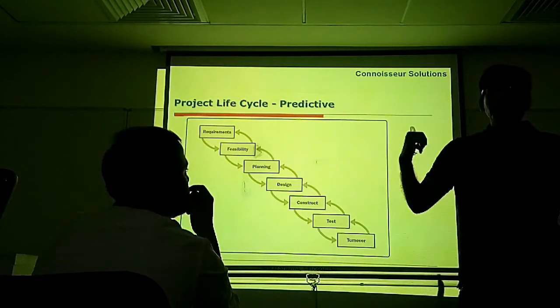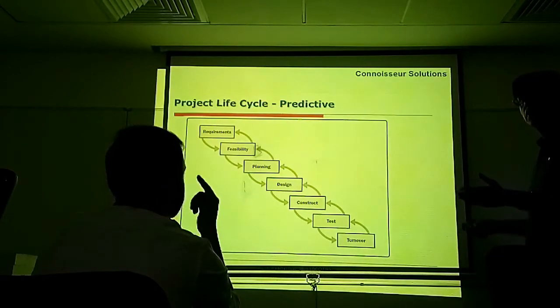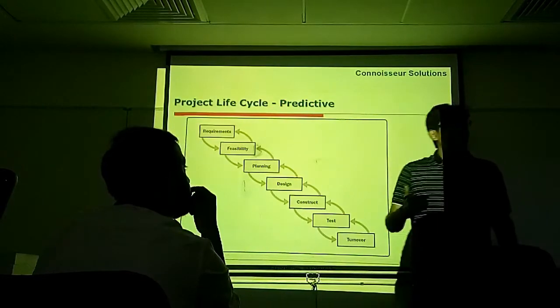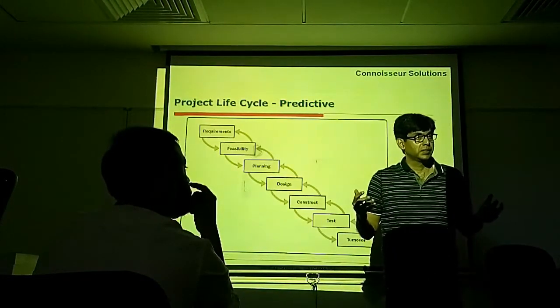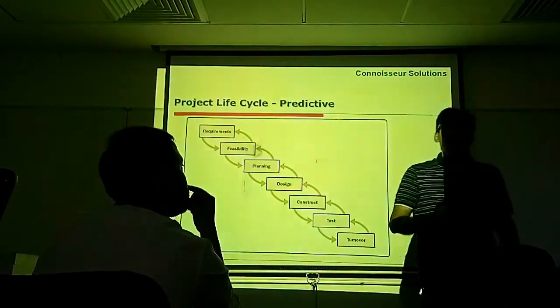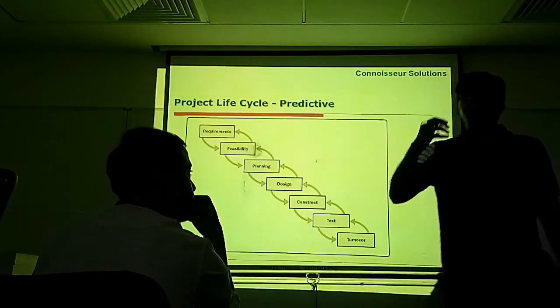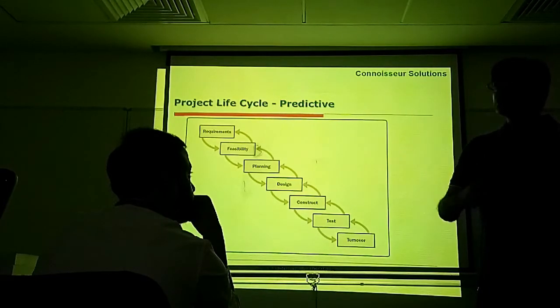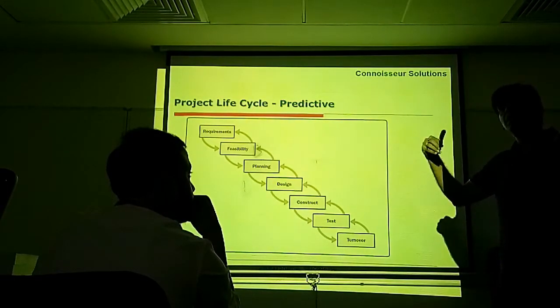Now this kind of life cycle, predictive which is more like a waterfall model, might not be very relevant for big projects. Big projects where requirements are not clear upfront, it's very difficult to deliver them using predictive life cycle.